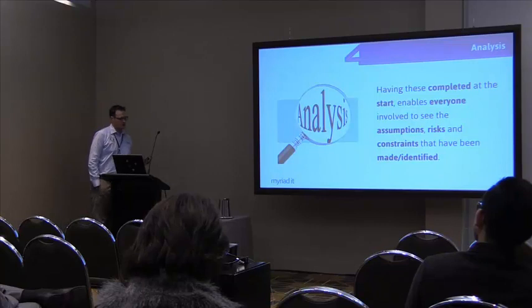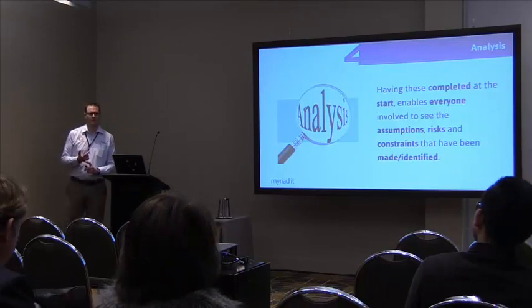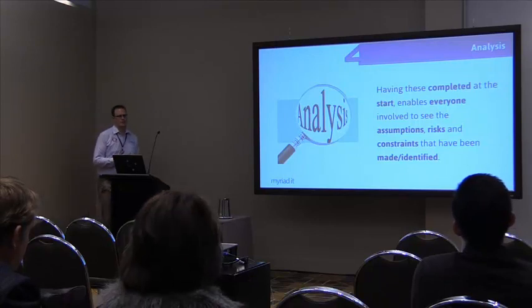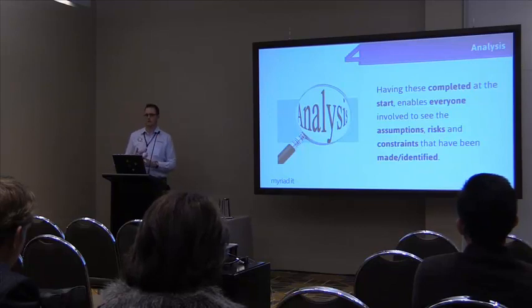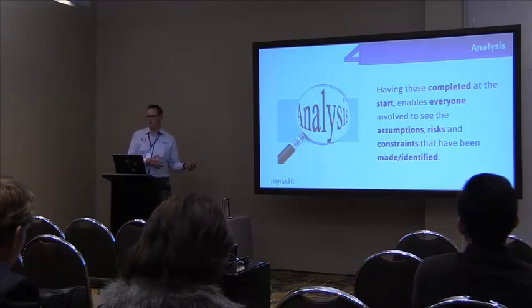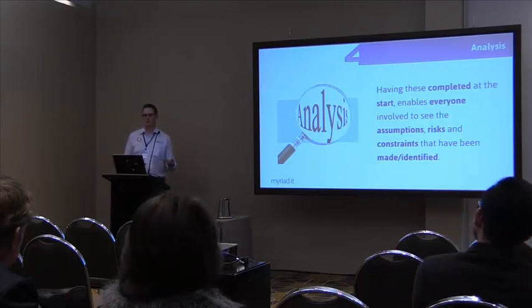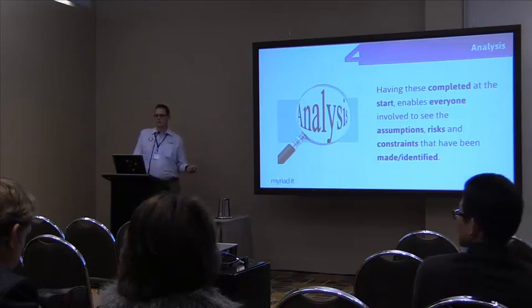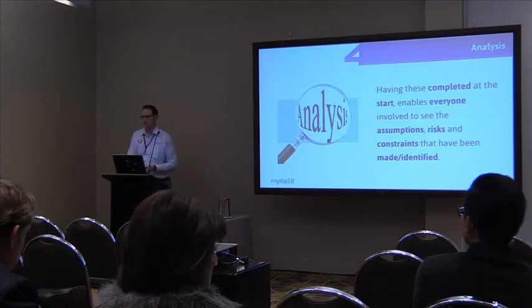Analysis. I use the word analysis, but it's cut down into 3 areas: what are the assumptions we've got with the upgrade? What are the decisions that are getting made? What's going to be there to do? What are the risks? Have I got risks for people? Have I got risks for timing? If I start the project now, I've got Christmas coming up. Are we going to shut the project down for 5 or 6 weeks, or are we going to push through? Who's having holidays? What's the risk also if I lose this person? I've got a contractor on, that's my key AR person. What happens if they move on? What's the impact there? And then also constraints.